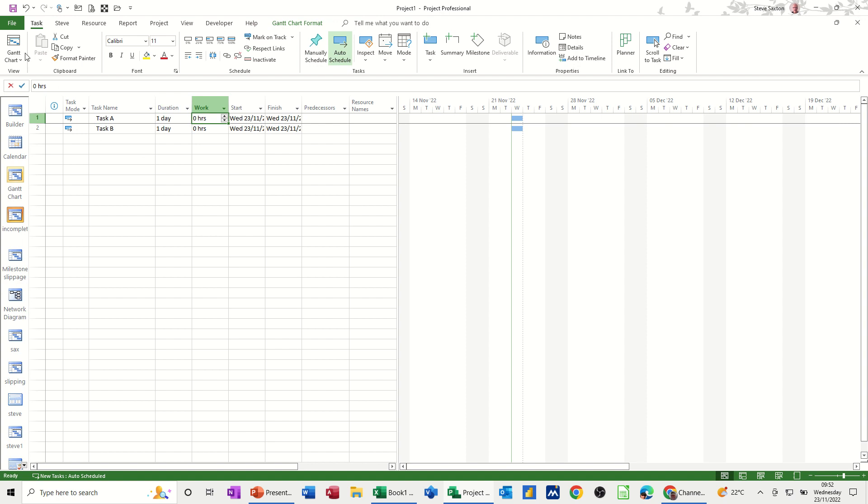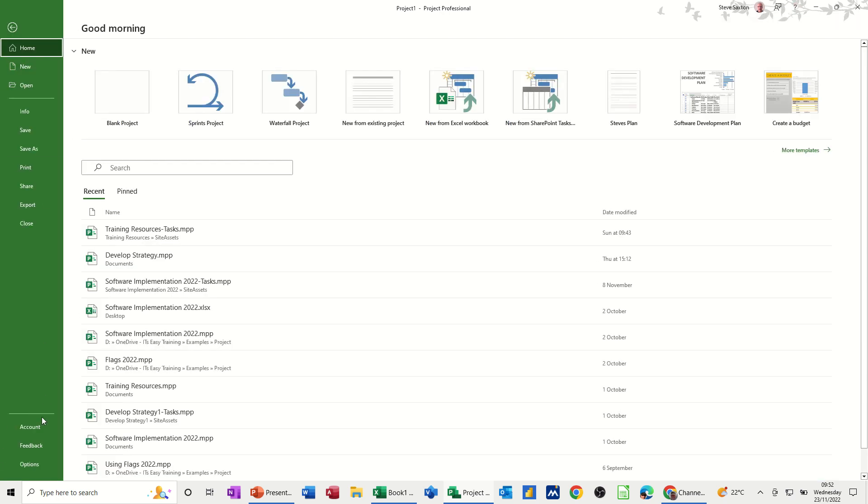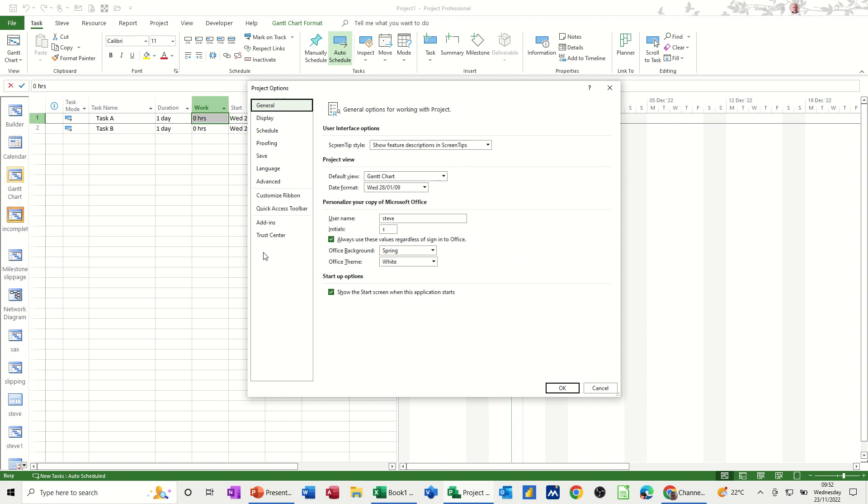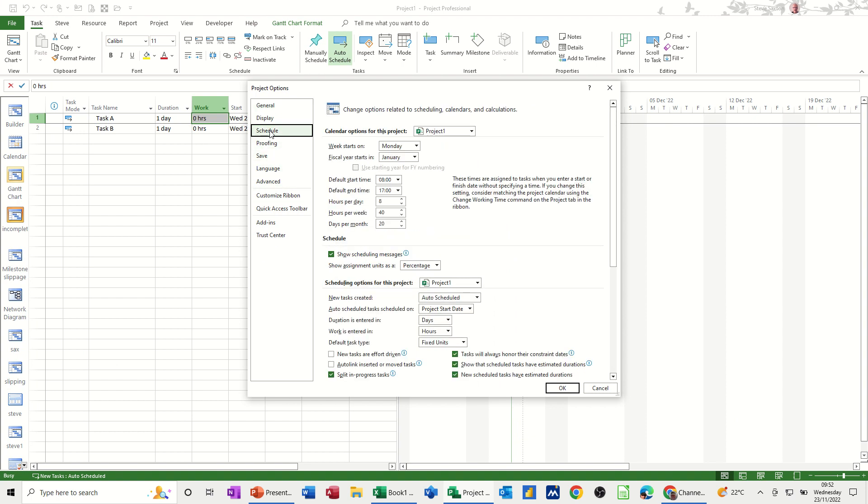you want it set in and changing from the default. So again, you have to go back into file, options, this time schedule. So we've just been in here for this. And this is where you come also for duration is entered in days. And then you just change that to, say, hours.